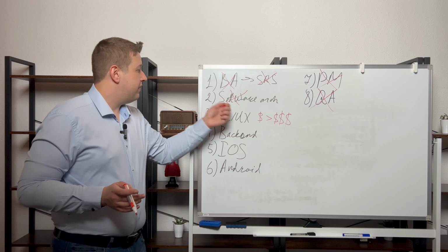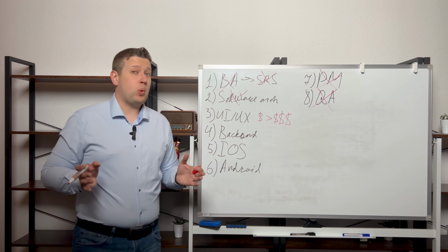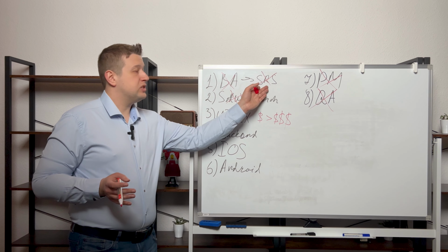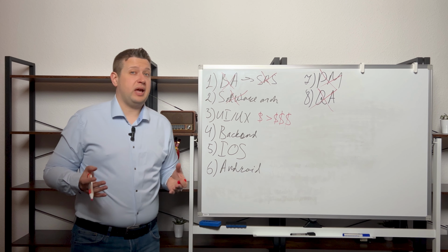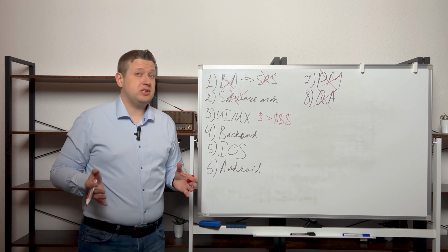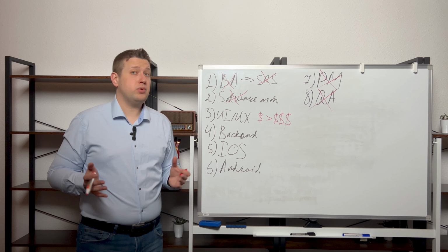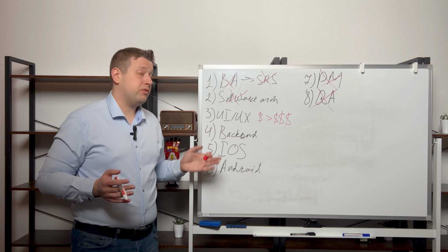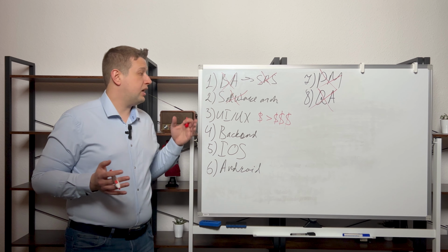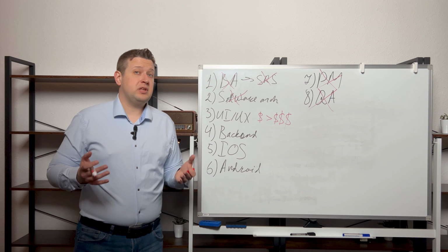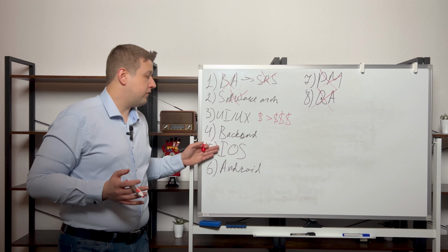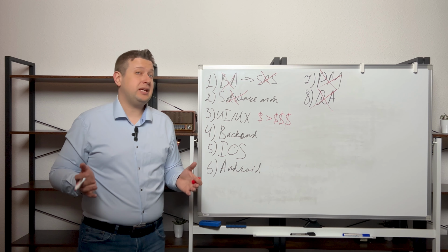So what happens in this case is the team is already twice less than it's supposed to be, and also there is no document specifying how the final product should look and work. So everything is going around the cheap clickable designs that in best case scenario represent 70% of what's supposed to be there. And whenever any of the developers find missing parts in the designs, they usually struggle to get those done because designer already delivered his work and moved on to another project, which means developers are supposed to do the missing graphics work themselves, which they actually hate to do.